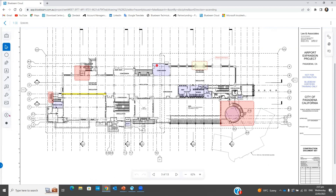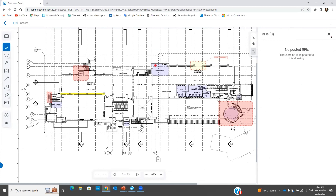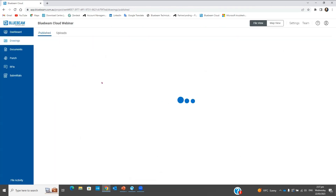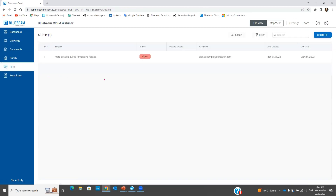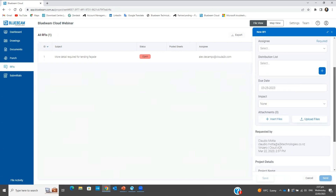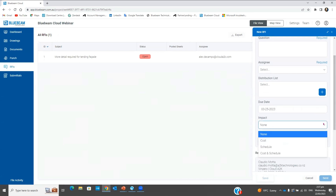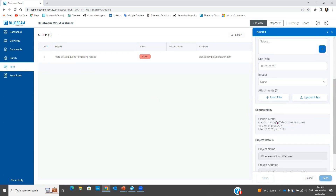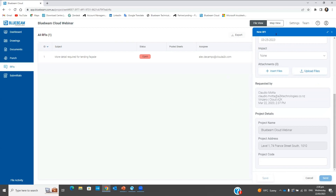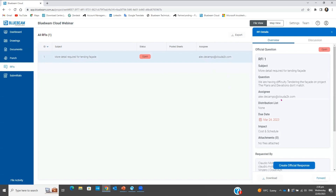Next I'll create an RFI. I'll show my RFI session — I've created one here already. To create another it's straightforward: you fill in the form with subject, the question, distribution list, date, the impact — whether it's cost, schedule, or both — who is requesting which is myself, and the project details. I've created one here already for demonstration.